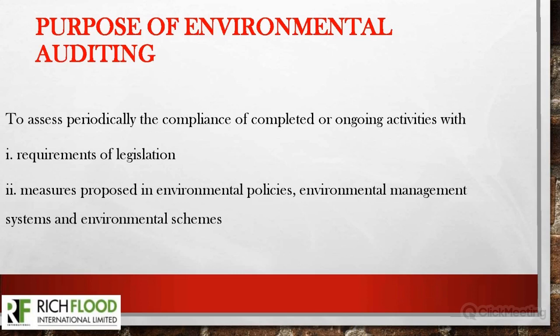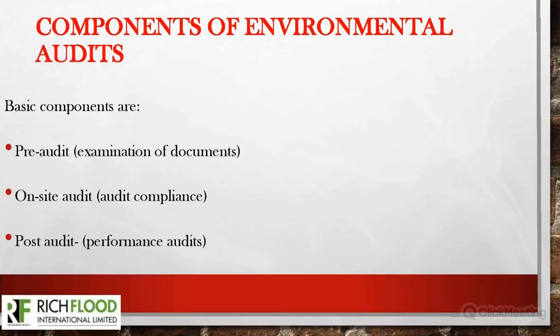We have it as to assess periodically the compliance of completed or ongoing activities, which means this audit comes after environmental impact assessment, because the project might have started and a lot of activities would have been carried out. Therefore, we assess the periodic compliance of all of these activities with requirements of regulation and the measures proposed in the environmental policies, in the environmental management system, and in the environmental schemes generally.